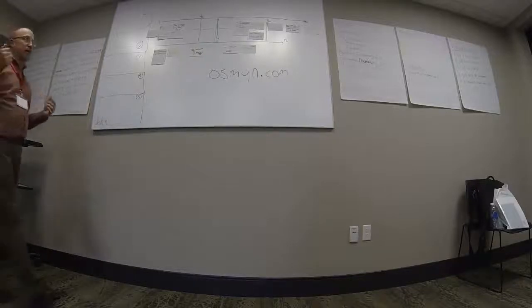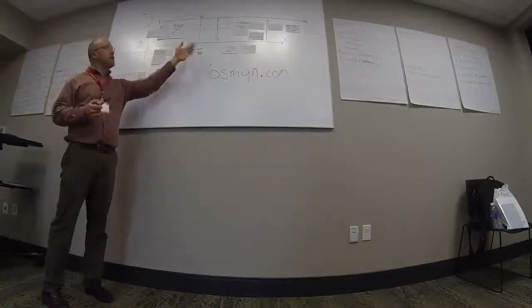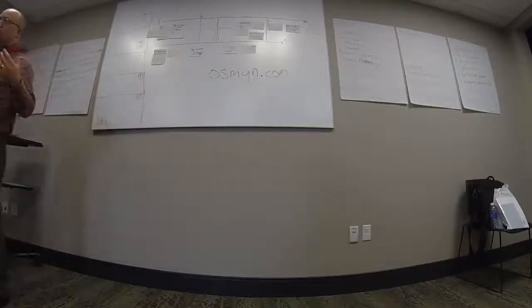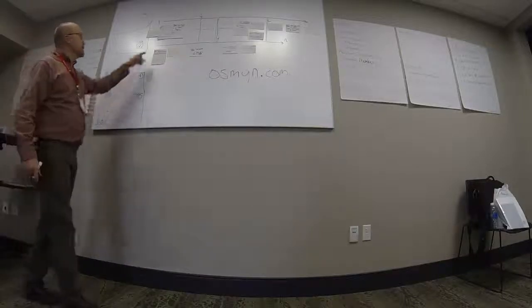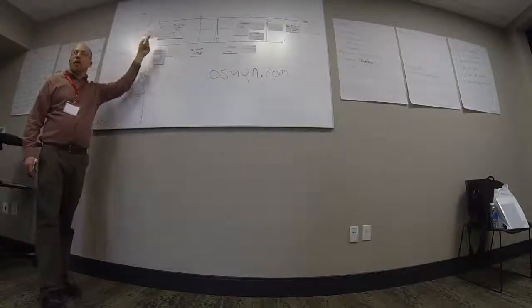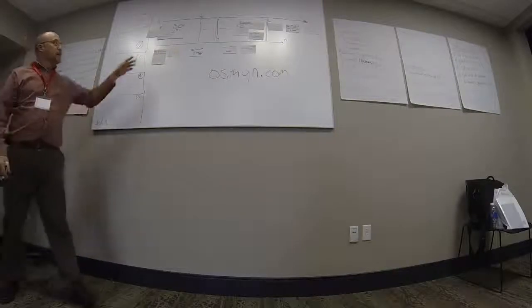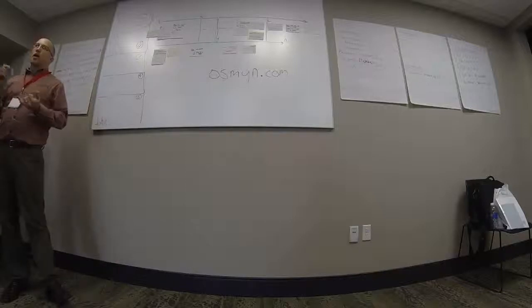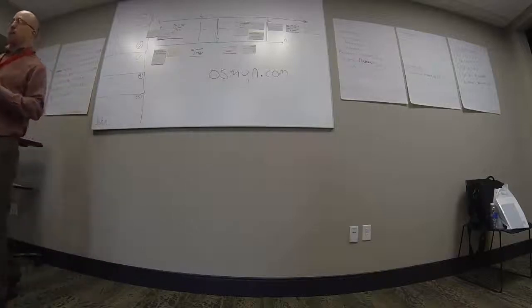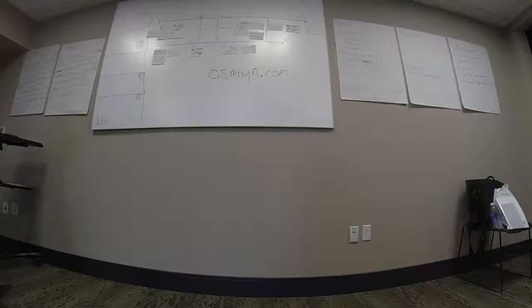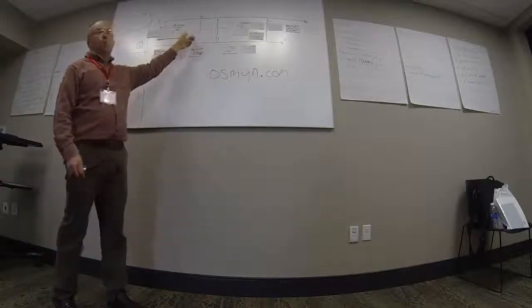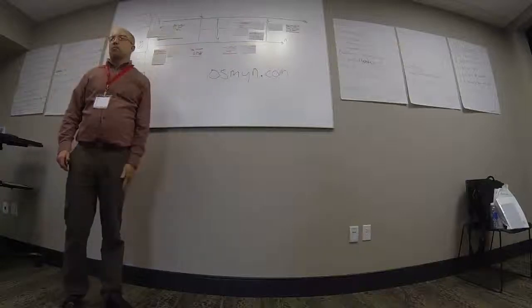And then we'll get together and we'll estimate the size of each of these, at least down to this core feature set line, using a comparison routine we use that says, I've done something like set up a website environment before. I know how big that is compared to other things. And so we'll go and we'll call point each of these stories. And then based on those points, we know how many points we can do in two or three weeks' time.